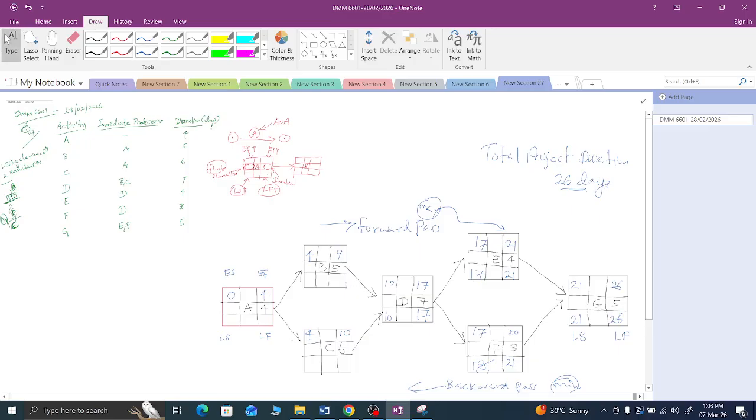You have to put just 10 here and 10 here, because if you are starting latest here, you have to finish latest on a particular same day. So the 10th day, right? So 10 minus 5 is 5 here, 10 minus 6 is 4 here. Which one? Same problem. So minimum one you have to put here. So minimum one is 4, you have to put minimum one here. So 4 minus 4 is 0. So that is the way of filling these cells, right?